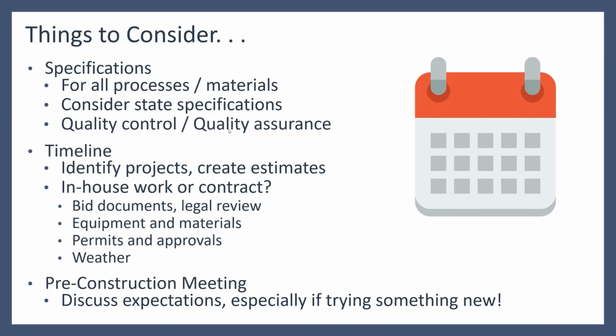If you had said, well, I'm going to do a slurry seal, that's what's slated for here. I put this budget together and it got us over into a year later's construction season before we could actually do it. Is that pavement still in a good enough condition to benefit from a slurry seal, or does it now need something more substantial? So keep that in mind, especially when you're dealing with those roadways that are at the critical point.